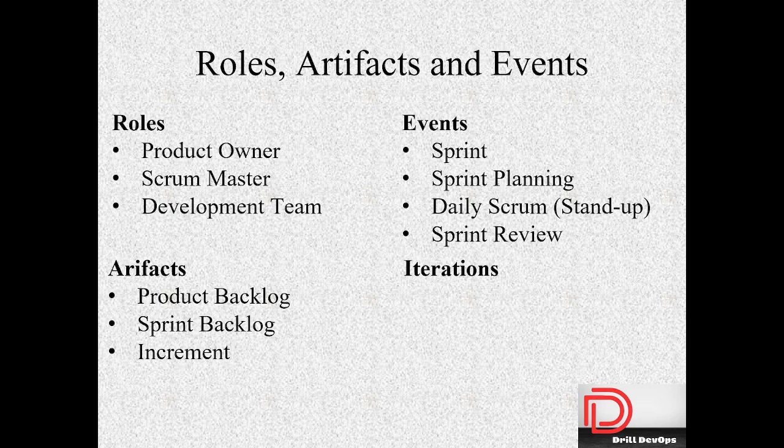The development teams are managed by the development manager or dev lead, and he is going to split the work between the individual people. He will take the small tasks and assign priority to them, and he is going to make sure that each piece of work has been calculated on an hourly or daily basis. He will help the Scrum Master or product owner understand how much time it is going to take for each requirement to materialize. That is how the development team and the dev lead or manager can help individuals perform their roles on a daily basis.